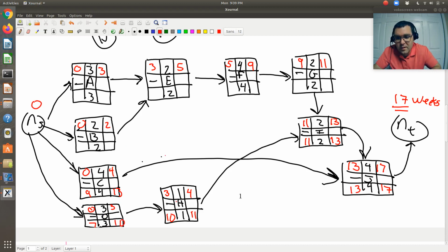So that takes care of that path. So now let's go from I to G. Latest possible starting time for I is 11. So looking backward, I is dependent on G, so the latest possible finishing time for G is 11, has a duration of 2, so latest possible starting time is 9.